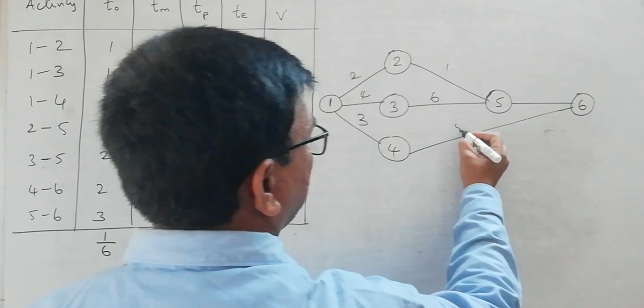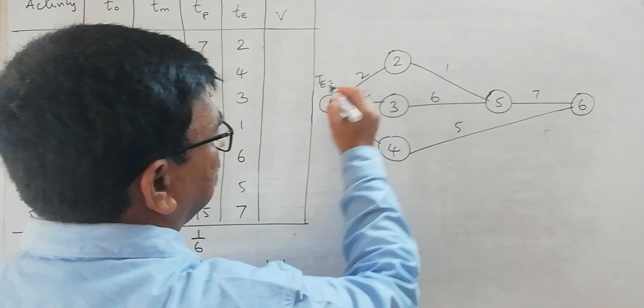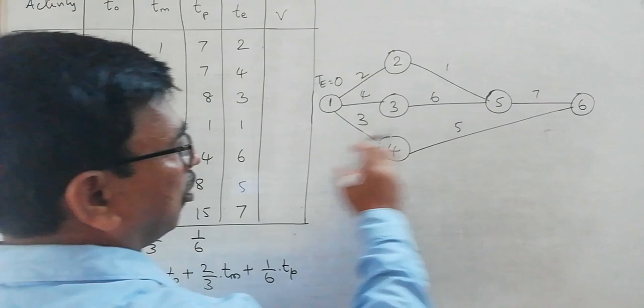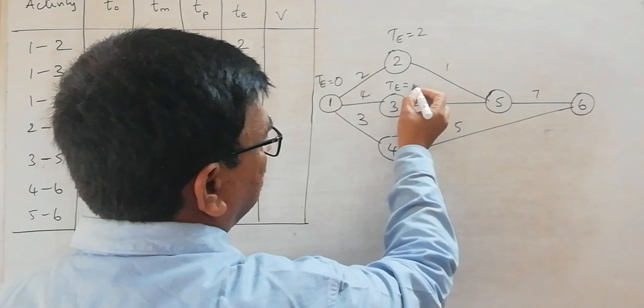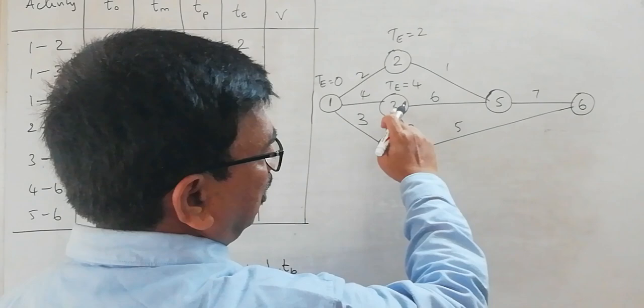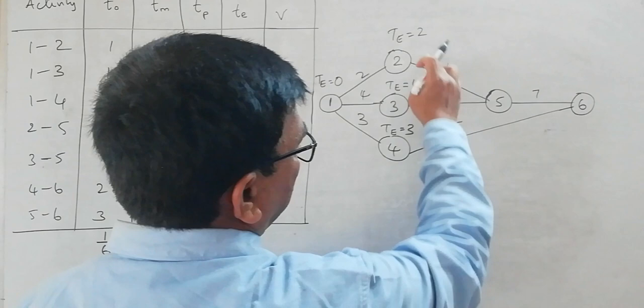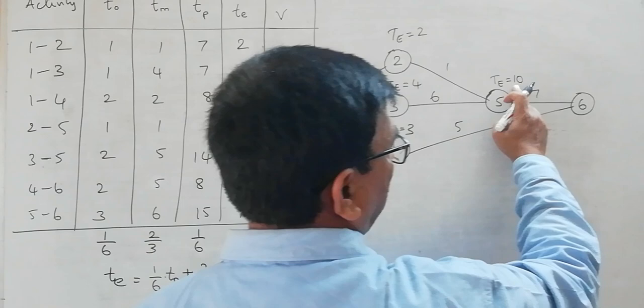Now we estimate the earliest times. At node 1, TE = 0. For node 2: 0 + 2 = 2. For node 3: 0 + 4 = 4. For node 4: 0 + 3 = 3. At node 5, there are two paths — from node 2: 2 + 1 = 3, and from node 3: 4 + 6 = 10. Taking the highest value, TE at node 5 = 10, giving 10 + 7 = 17 at node 6. Along the path via node 4: 3 + 5 = 8, and considering the larger value, TE at node 6 = 17.